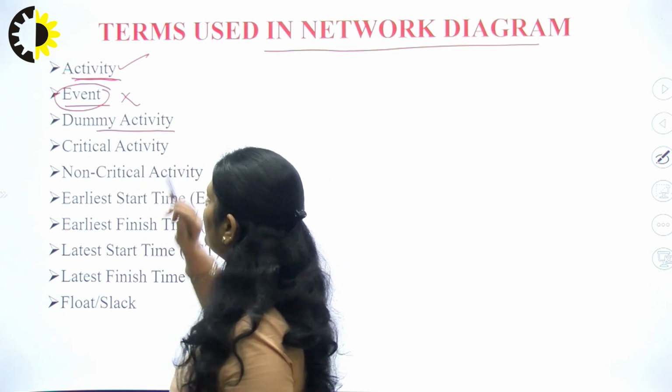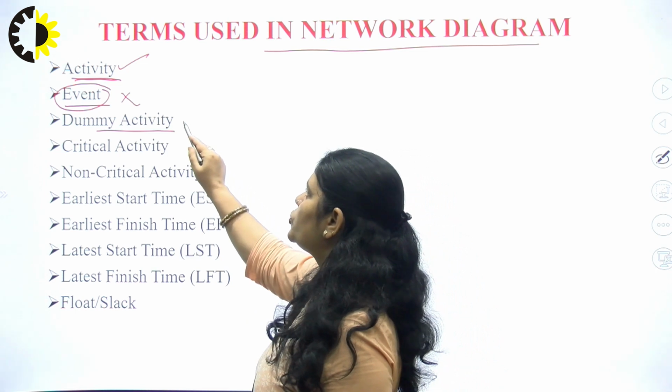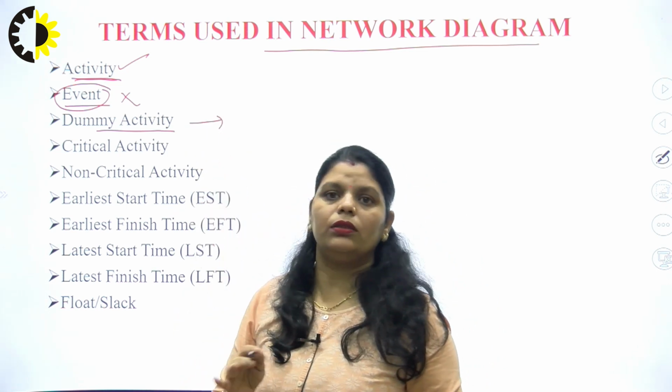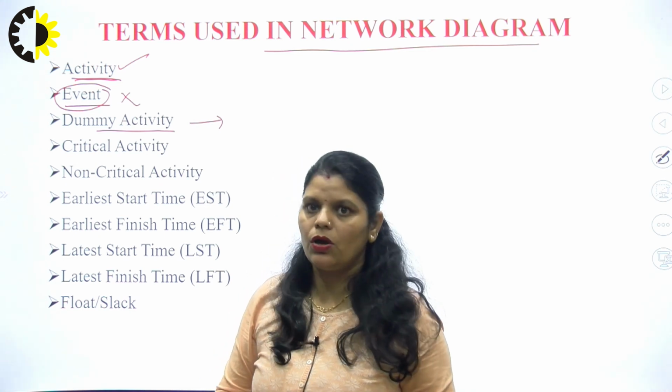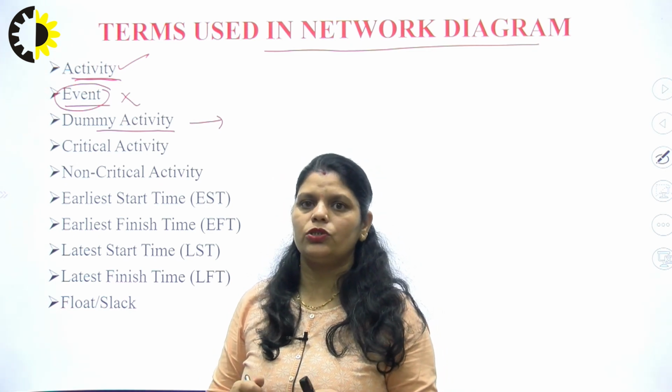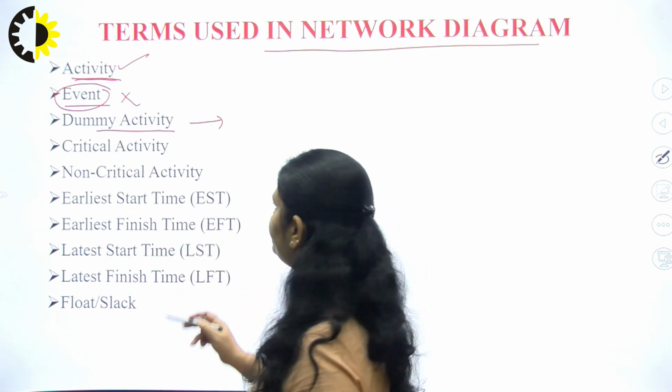Now, what is the dummy activity? Dummy activity is basically used to show the interdependence between two activities or between the different activities. Okay, how they are dependent on each other. So, we can show it with the help of the dummy activity.